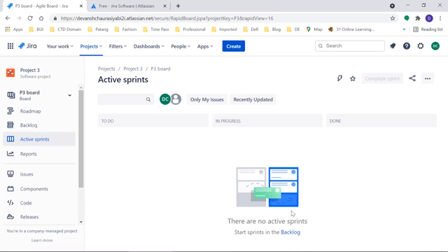Now, issues that we captured earlier, an issue can be an epic, a story, task, subtask, or bug. Epic is at the broader level. Under epic, you'll have multiple stories. Under story, you can have subtasks. Or under epic, you can have tasks. And under task, you can have subtasks. Clear? You need not have an epic. You can directly have a story. You can directly have a task. You cannot directly have a subtask, because a subtask is under a story, or under a task. You can also have a subtask under epic, if I'm not wrong. We will check that.